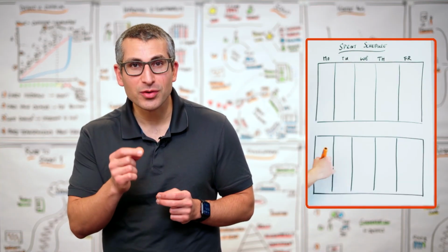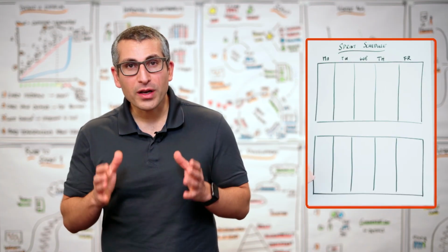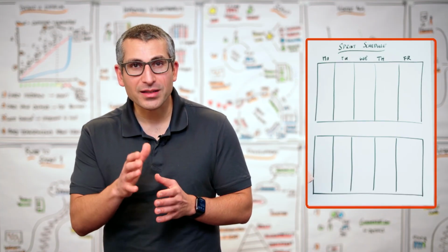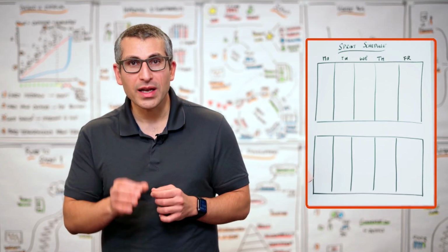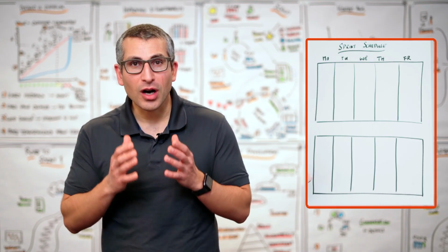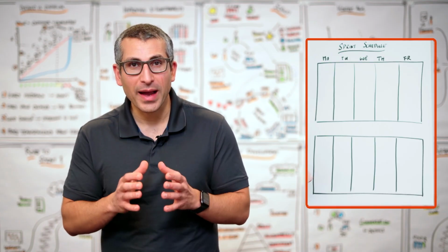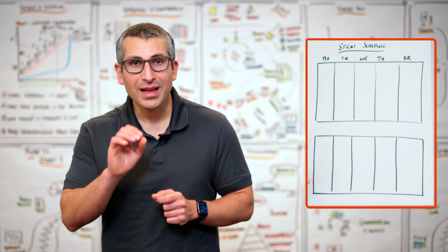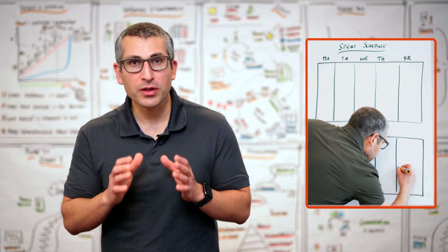Basic customer centricity. So before we go and schedule each of those events, we start out by asking our most important stakeholders, at what day and what time would you be available to come to our team and give us feedback on what we have delivered in that specific sprint? That's the time for our sprint review.